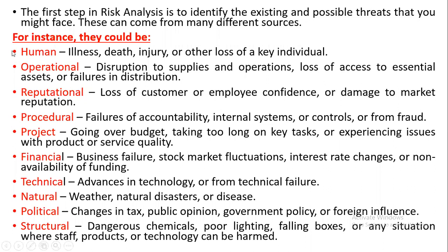And then operational. Regarding this human risk, generally in software companies, or in any organization, for each and every employee, if any particular work is there, one backup person will be there. That means whenever you are executing any project, everything should not be known only to one person. When you are developing code, you need to write it in such a way that it is readable, that means you need to write comments. Because if you resign from the company after 1 week or 1 month, the project should not close because of you. Whether you are there or not, that project has to go on.